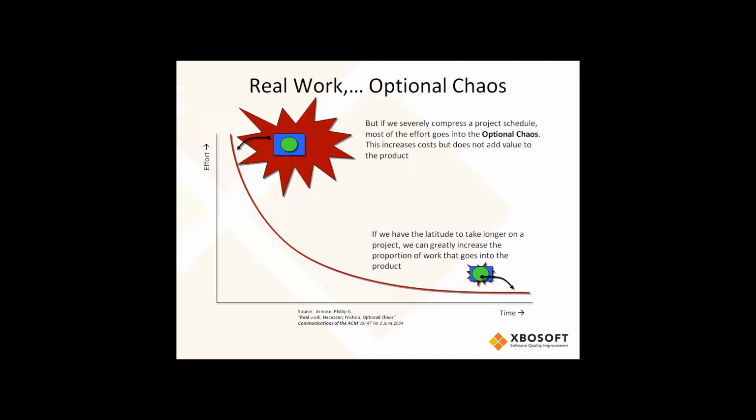I'm going to throw a hypothetical question out there, and I don't think I can see your hands or your body language. If I double headcount and I try to compress schedule, going from a team of 10 to 20, how many more defects do you tend to expect you might find in the code? Do you expect to find double the number of bugs if I double headcount? Would it be triple? Would it be 4 times? I'll go geometric. Yeah, it's geometric. It's actually about a factor of 4 to 6.